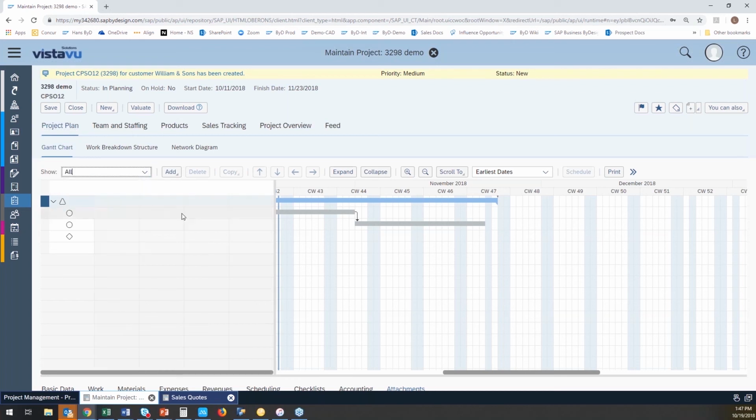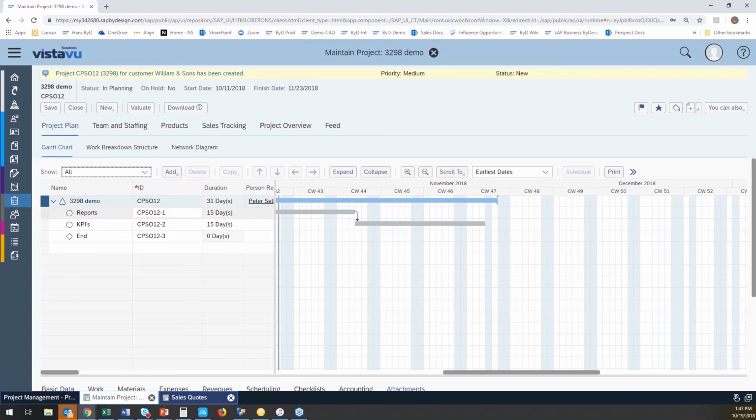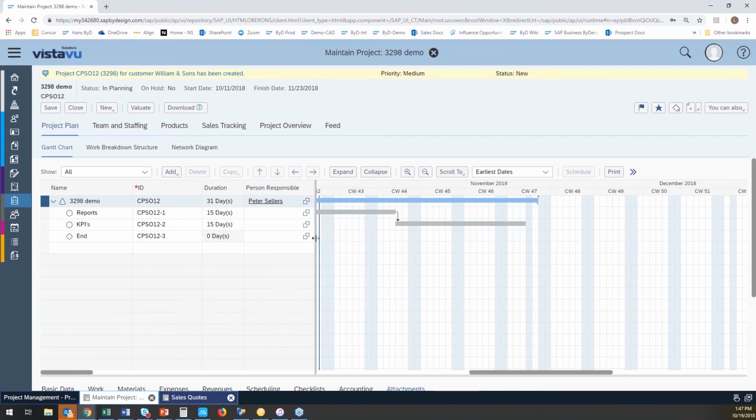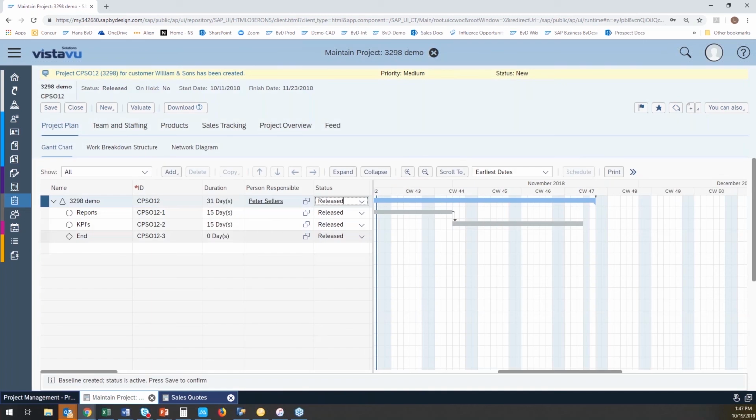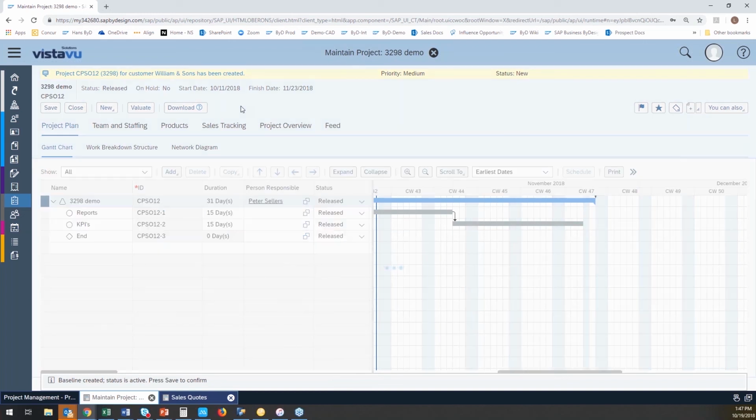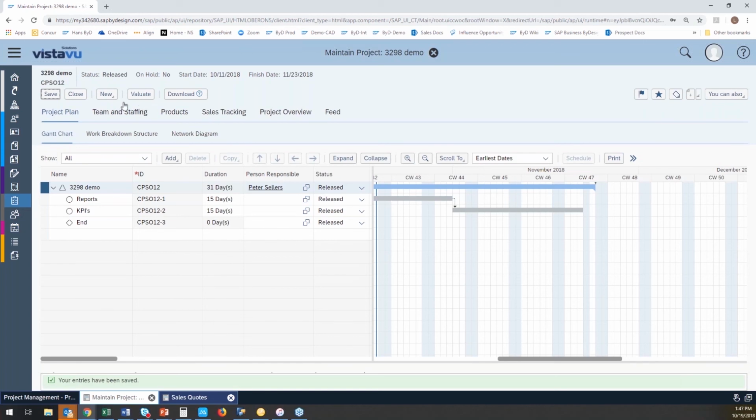So now we've got the two tasks that we can now have Tanya assigned to, and let's go ahead and release that project. We can create baselines, so when we have change projects, different snapshots for when I'm doing changes within the project plan, so I can actually monitor those changes over time to my project through the use of snapshots. If I want to make sure I'm tracking in a downward fashion. All right.